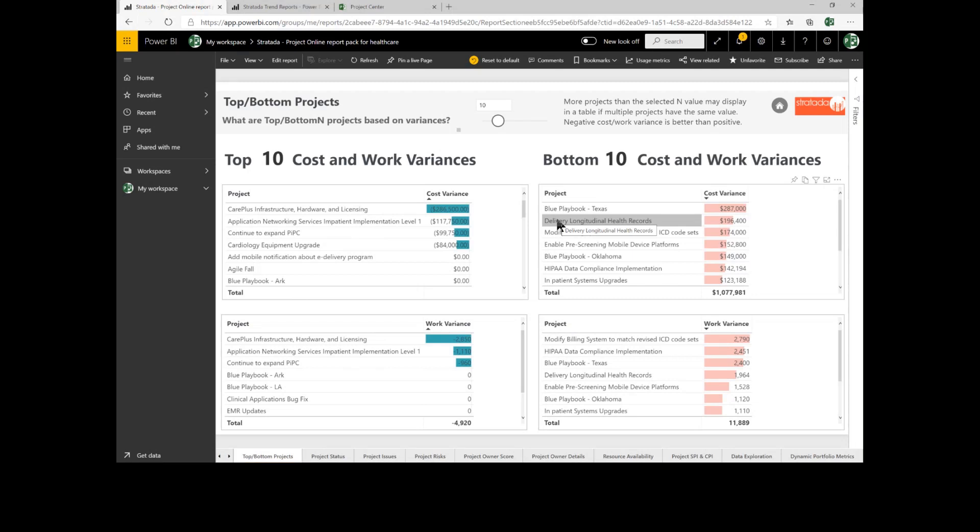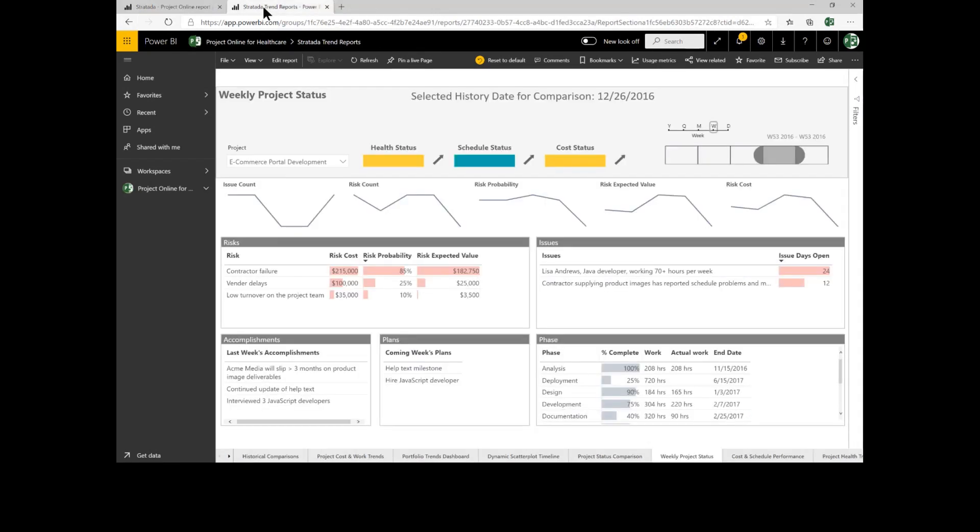Let's go ahead and start to look at some trend reports as well. When we look at our trend reports, one of the other key things that Stratata does is allow you to take snapshots of your data. Snapshots are important because they give you that historical view of all of your project information and we can compare this information over time.